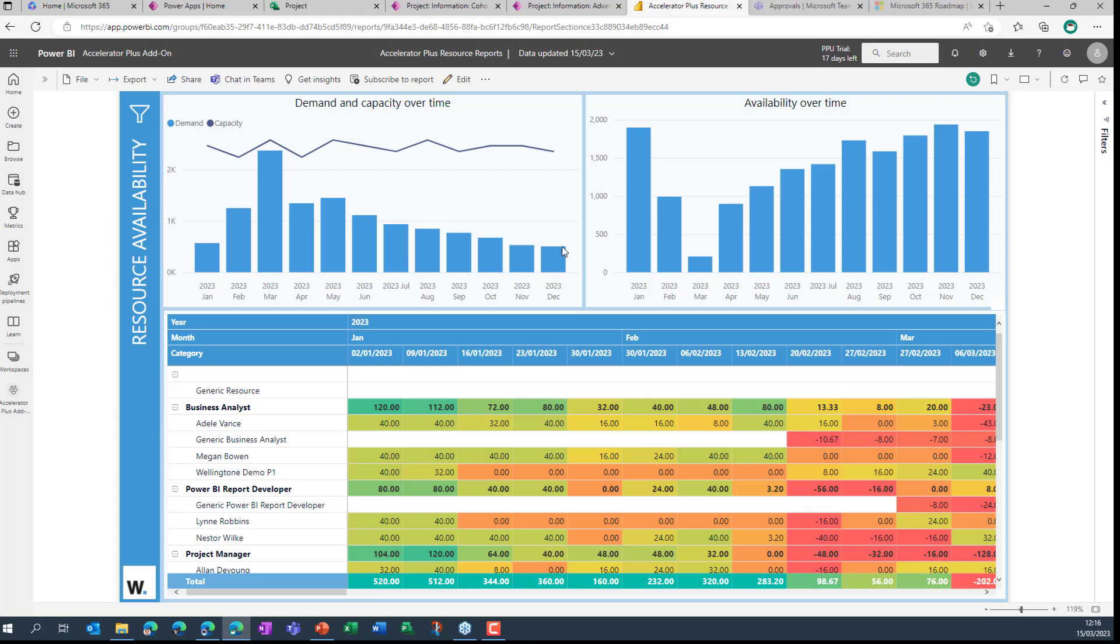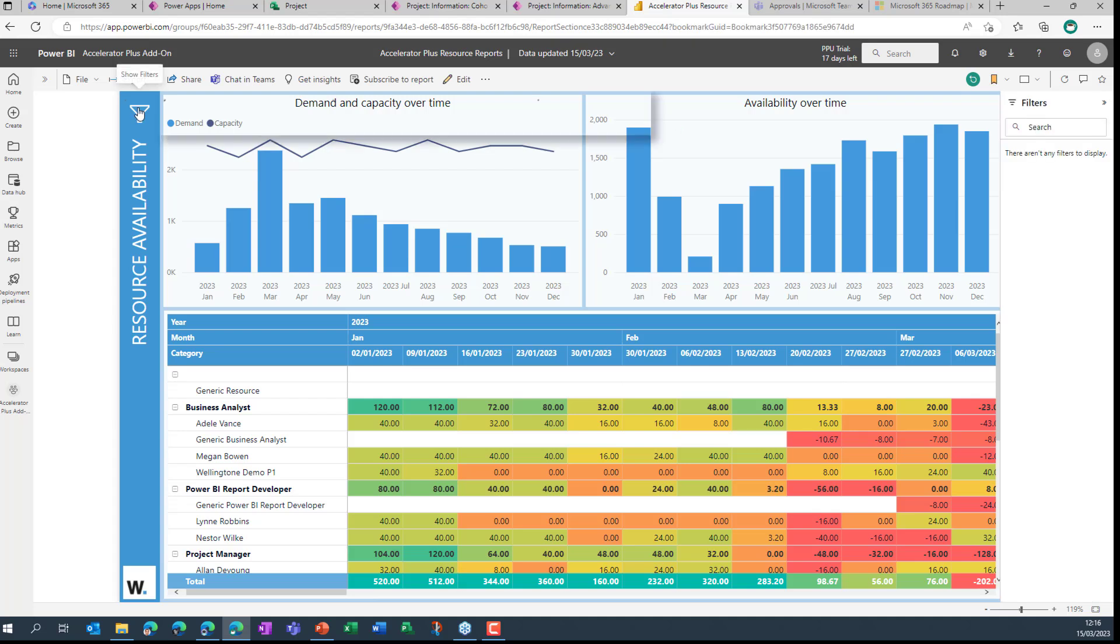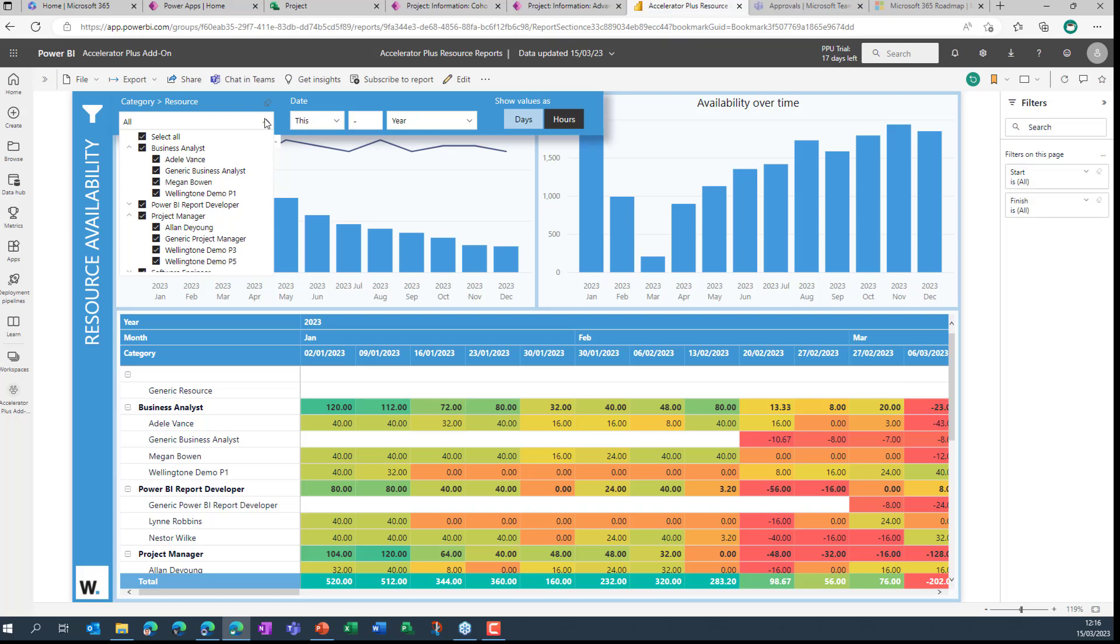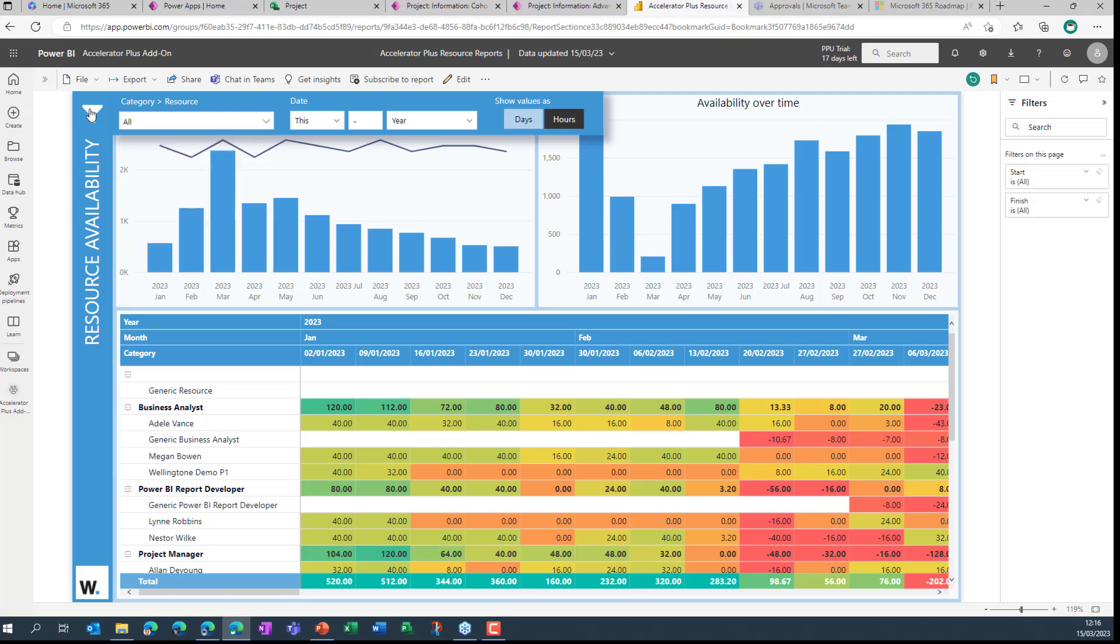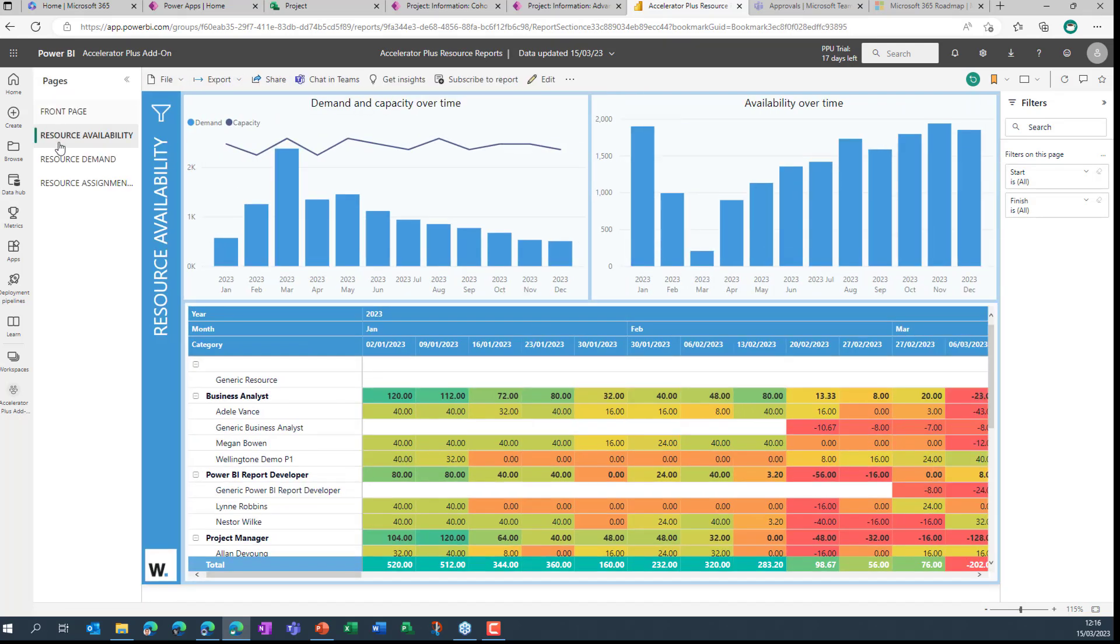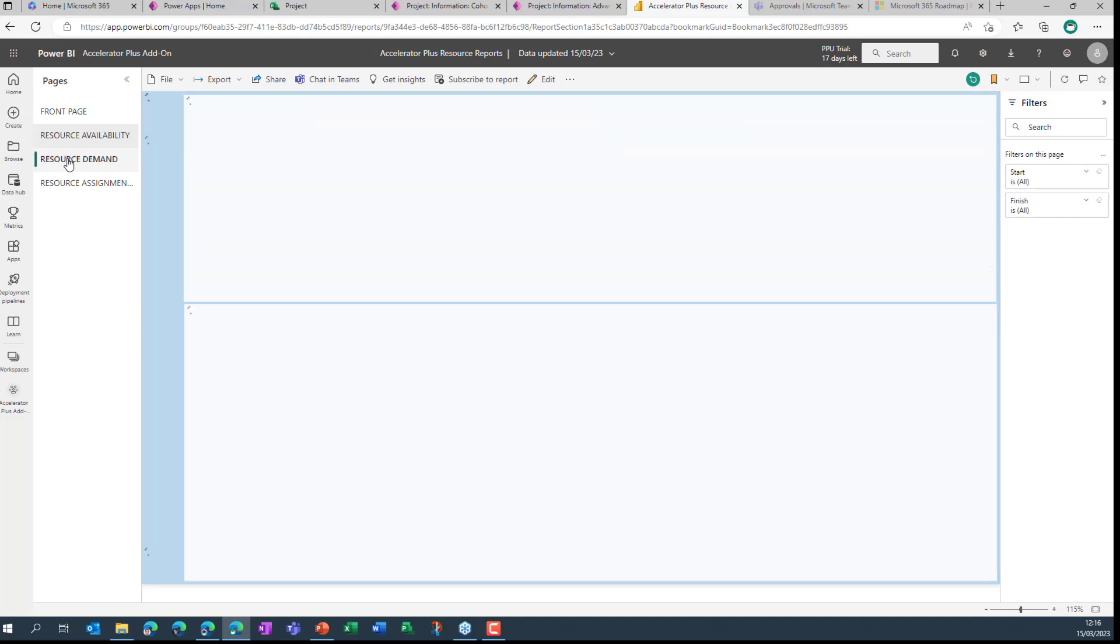We've got some corresponding reports here at the top showcasing demand and capacity over time. So the bars representing demand, the line chart representing capacity, and we can see we've got resources sitting around, maybe not fully utilized. So that's something we could look to address. Of course, you can also go in and apply certain filters. I'm going to leave these as they are for now. Let's minimize that again.